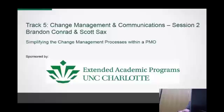Well, yeah, some simple changes, like when you do your assessments, depending on the amount of organization it impacts or other projects, it might be a sub-board, or maybe just a technical board versus a full CAB board. I like that idea. And for the recording, I'll repeat it to make sure I understood, my active listening skills, right? If we have different levels of changes based off our swim lanes, it could be sub-boards. So maybe a smaller change for a less risky project with swim lane A or B would go to a different board, versus the full-out board of higher-level managers and whatnot. I like that. That's a great suggestion.